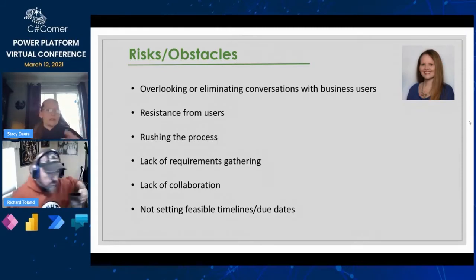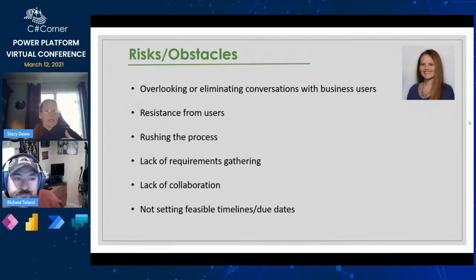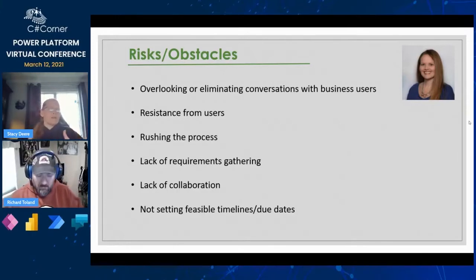So we follow up to make sure that we're getting that information from the business users. And also, if you have a question on something, like you don't exactly understand what they're asking or what they're stating, please make sure you follow up. We've had an instance where someone said something, and it was just because they didn't understand the terminology. It didn't seem relevant or like it even connected into the actual meeting that we were having on the process. It wasn't followed up on, and it had a rather large impact on the process. So find ways to make sure that you're getting all the information. And if you don't understand, ask questions.